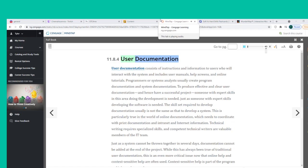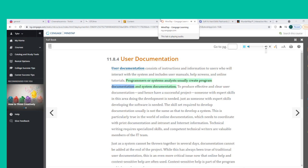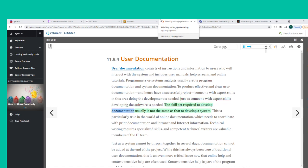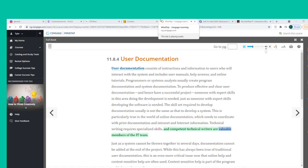User documentation consists of instructions and information for users who will interact with the system, including user manuals, help screens, and online tutorials. To produce effective and clear user documentation, someone with expert skills in technical writing is needed. The skill set required to develop documentation is usually not the same as that required to develop a system. This is particularly true in the world of online documentation, which needs to coordinate with print documentation and intranet and internet information.